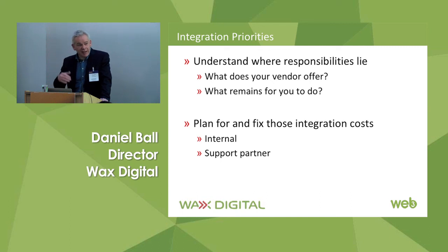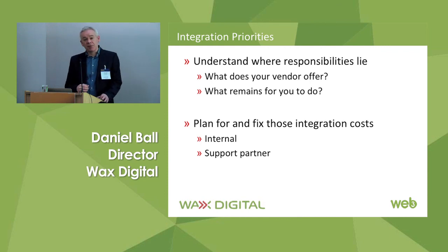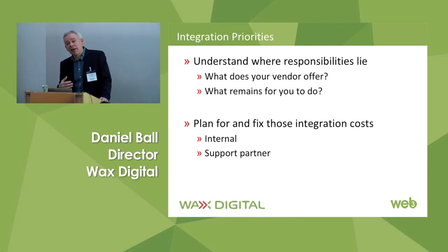And importantly, if that support is outsourced to a third party, which obviously a lot of people have, their finance system support outsourced to a service provider, make sure that you speak to them early in the process so that you understand what costs are going to be involved from them, because we have seen real horror stories where this should only take a couple of handfuls of days, but people have been charged or quoted tens of thousands of pounds for doing the integration work on their local finance system because the solution provider or their support partner sees it as an opportunity to gouge for cost when they have nowhere else to go and no other alternative.